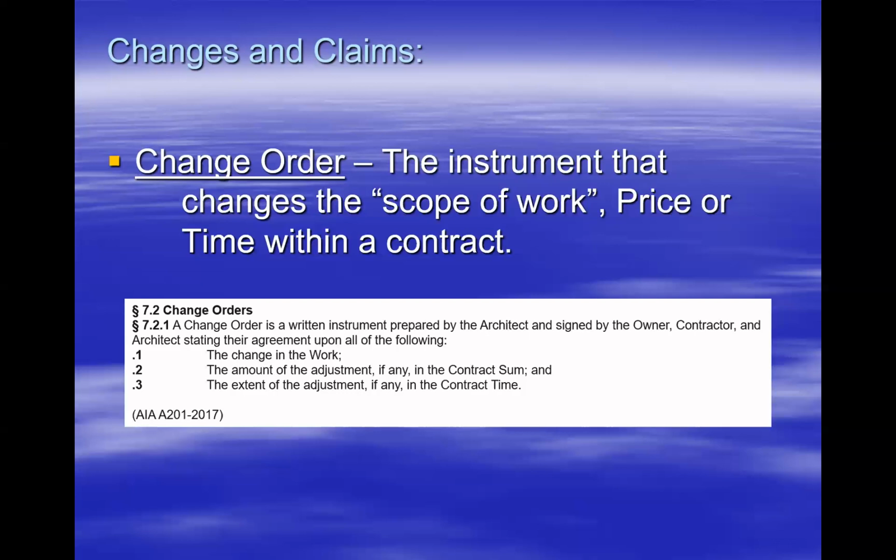That technically changes the scope of work, but just suppose in that example that the first light fixture that you're deducting or deleting out of the contract, let's just say that was a $10,000 item. And then when we go and we respec the new light fixture, let's just say that that was also $10,000. And so we're deducting $10,000, we're adding $10,000, but we're changing scope potentially.